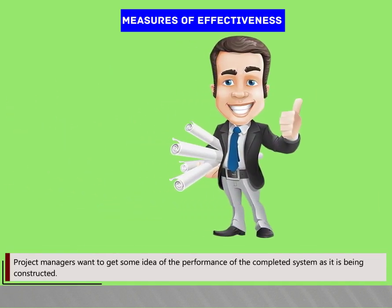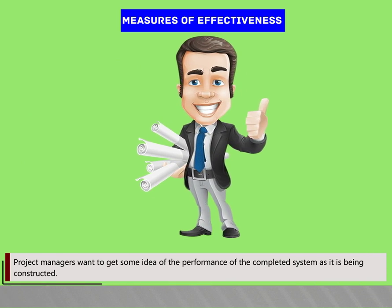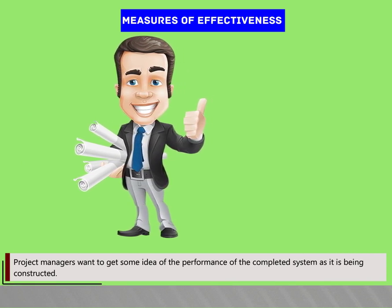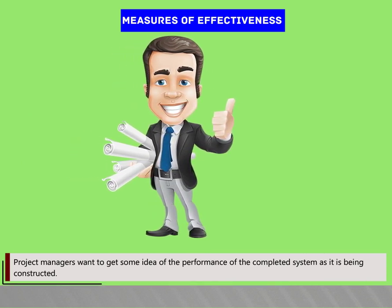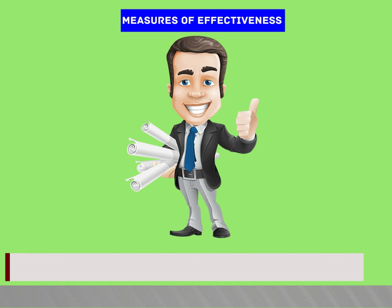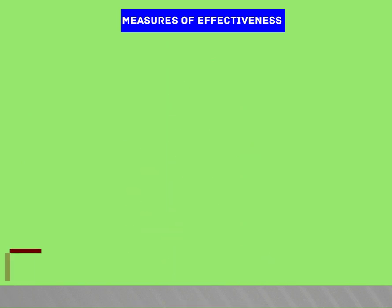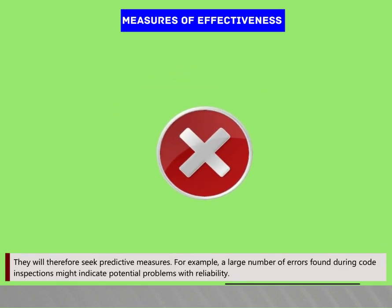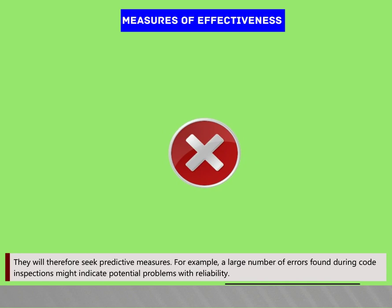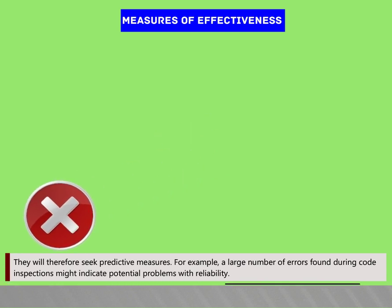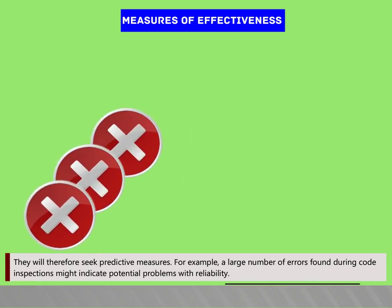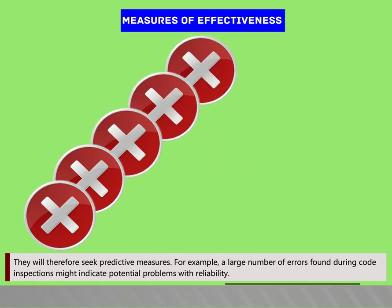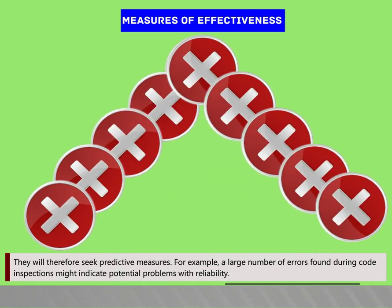Measures of effectiveness provide practical methods of checking that an objective has been met. Mean time between failures (MTBF) might, for example, be used to measure reliability. This is a performance measurement and can only be taken once the system is operational. Project managers want to get some idea of the performance of the completed system as it is being constructed, and will therefore seek predictive measures — for example, a large number of errors found during code inspections might indicate potential problems with reliability.